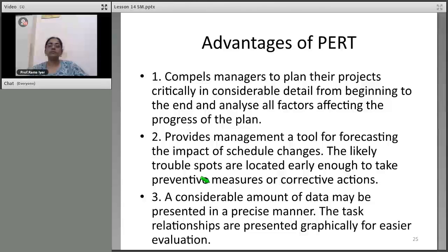So, here if you say, for sales, what do you have to do? Pricing of sales takes 10 days. That includes your 7 days. Correct? So, 14 plus 10 plus 10. That will give you a final figure. One final figure is 34 days. What is your longest path? 14 plus 7, which is your C, plus D, which will take your pricing, and then 10 days again.